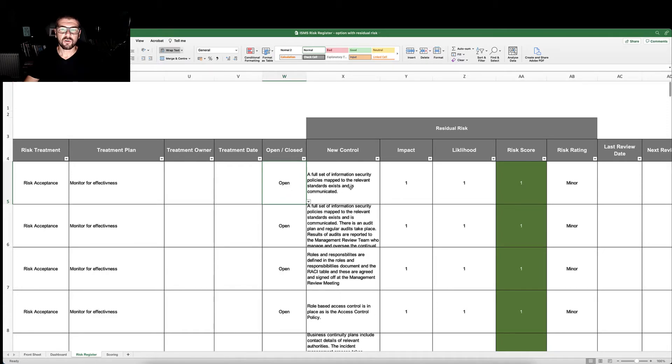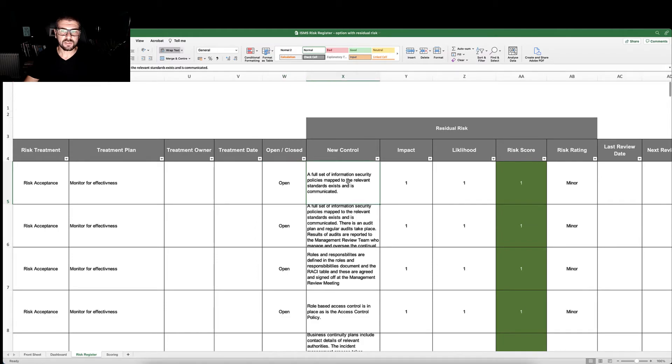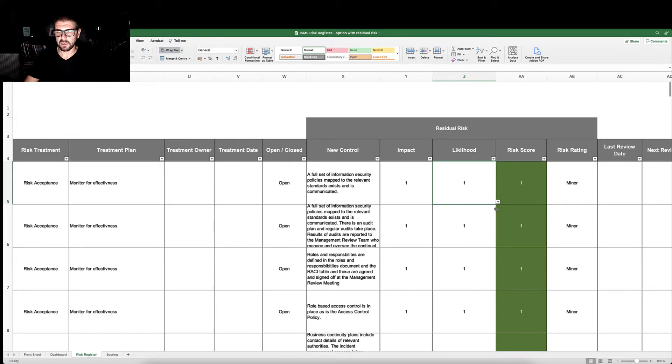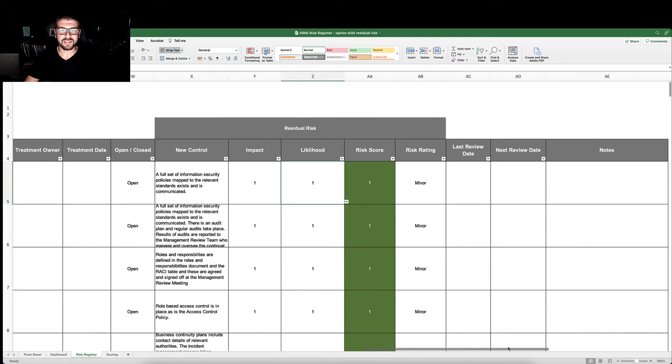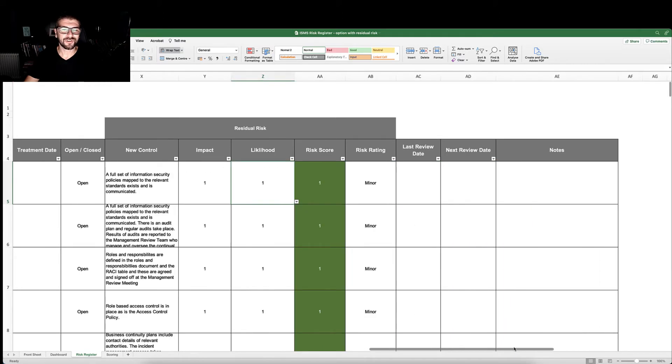As part of our residual risk recording, we are now going to record what our new control is. We're going to rescore the impact and the likelihood. Hopefully that score has gone down to show that the new control has had a positive impact on mitigating that risk.